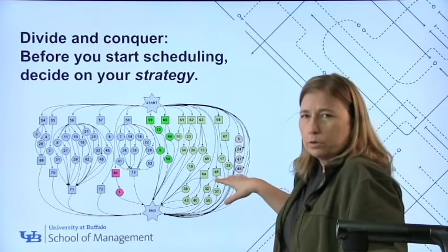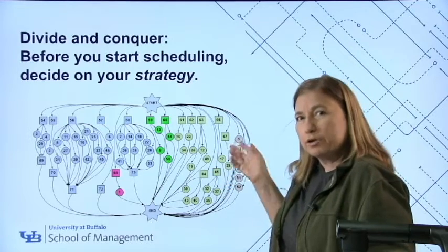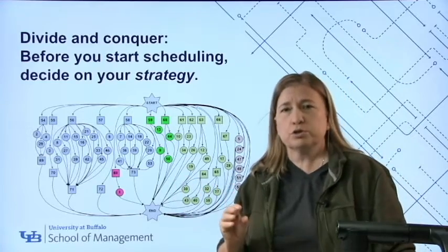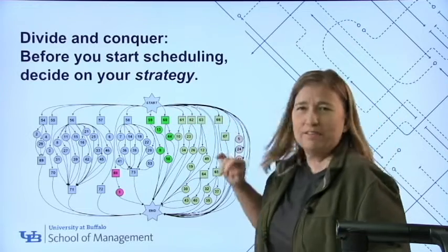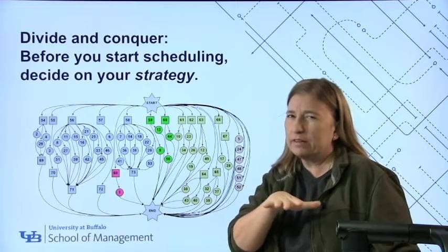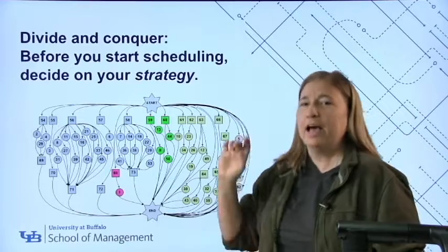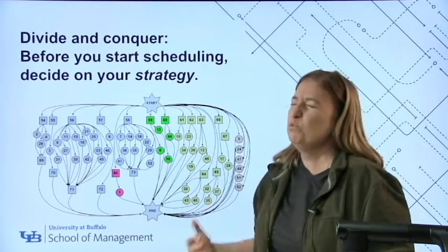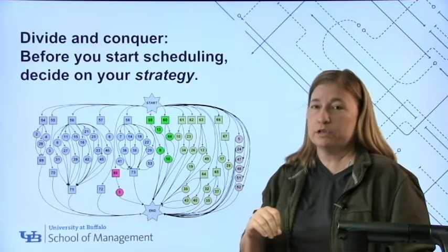It's different ways of carving up the project. Now, little word here. You may be looking at this and thinking about some other things like the opportunity to win prize points. And you go, well, my strategy is I'm going to figure out how to create the absolute shortest schedule. I deeply respect that. Don't have that be your initial strategy. And I'm only talking about those of you who are thinking like really competitively, right? Get a feasible schedule first, and then from the learning on that, start drafting a competitive schedule. It's just really difficult to create a competitive schedule from scratch when it's the first time that you've done it.